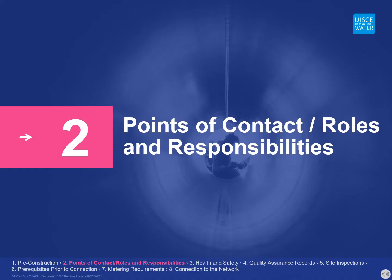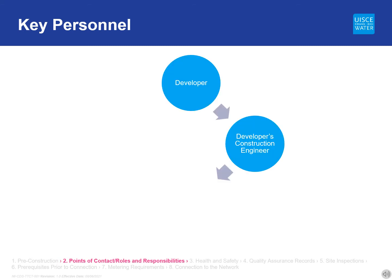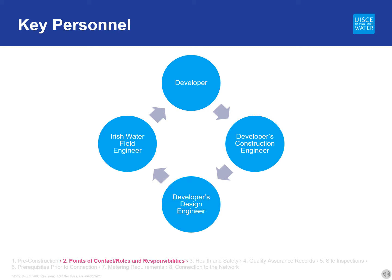During the construction phase, there are a number of key personnel who have a role in ensuring the successful delivery of the water services infrastructure within the development. Each of these personnel has specific roles and responsibilities. The key personnel are the developer, the developer's construction engineer, the developer's design engineer, and the Irish Water field engineer. When submitting the commencement notice and before work starts on site, the developer must appoint a design engineer and a construction engineer. Irish Water strongly recommends that they are fully aware of their roles and responsibilities in the quality assurance process and that they attend the pre-construction meeting.